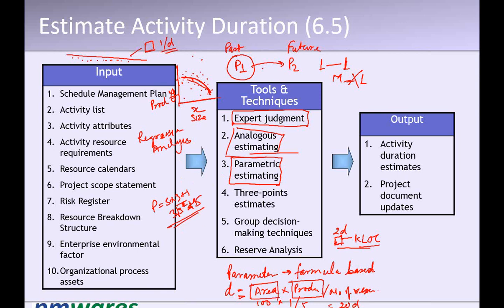Looking at the area, I put the area, I get the productivity. This productivity I applied here and use this formula. So this productivity actually is required to calculate the productivity. We need to look into various projects in the past. The more projects there are, the better our equation is. So if we are only comparing 3-4 projects, our accuracy level will be low.